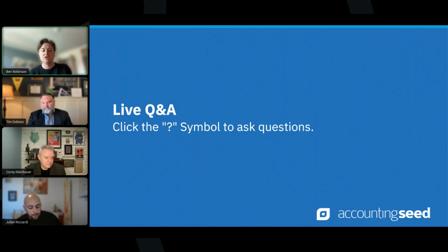That allows us to then create automations of those records from one place to another, where one individual can say, check mark on this project, we're ready to bill on this milestone. Automatically creates a billing record, notifies an accounting team member to then go and take action on that. That's a huge uplift for a lot of teams who are having to manually create that, or even in QuickBooks or a separate platform, go into a separate platform, click new, fill in the project name, the account name, and go from there.